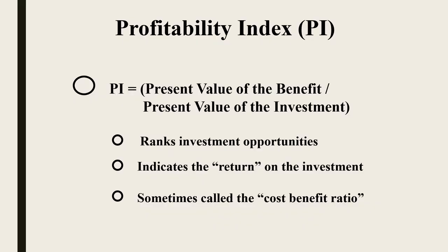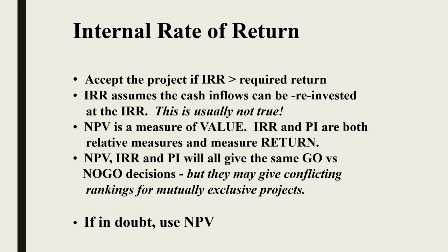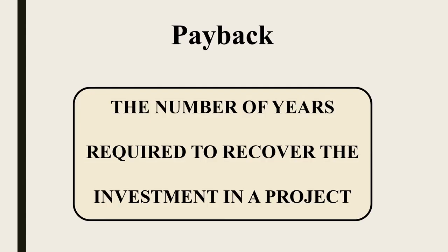Now I'm just summarizing these numbers. This is what we call the return — sometimes it's technically called the profitability index — and this is the internal rate of return. You can see there are some issues with the internal rate of return calculation, which is why we don't always like to use it. The key point is: if in doubt, use NPV. That's the way to go.